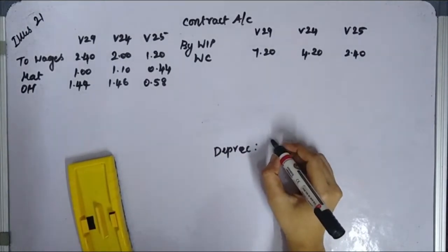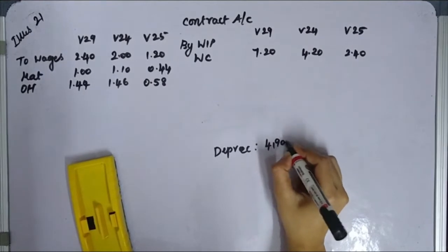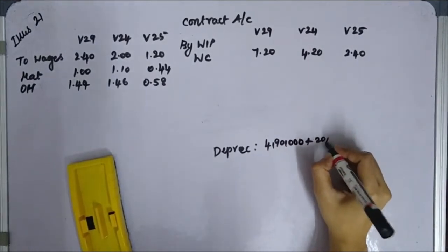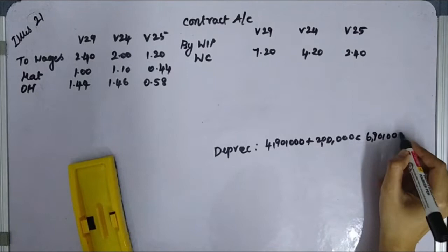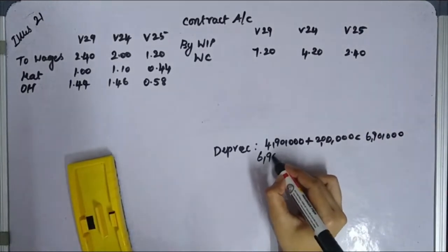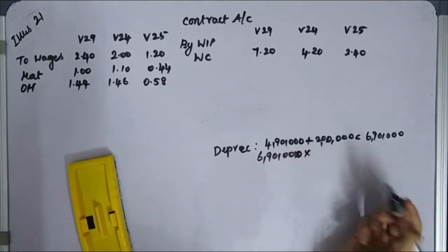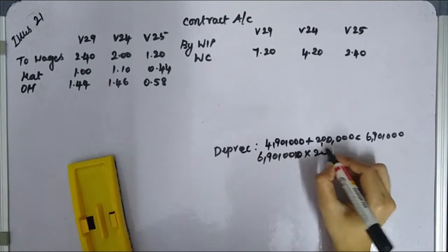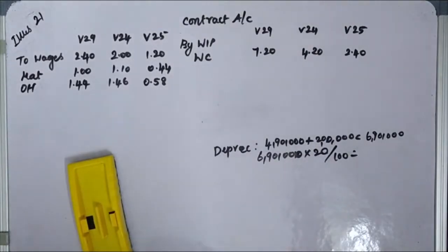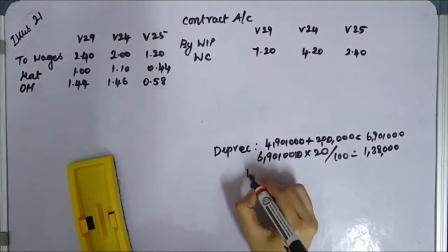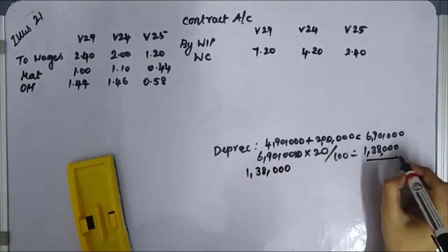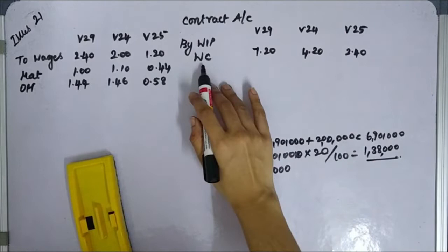Depreciation calculation: Plant and equipment is Rs 4,90,000 plus vehicles Rs 2,00,000, giving a total of Rs 6,90,000. Applying 20%, the total depreciation comes to Rs 1,38,000. This Rs 1,38,000 will now be allocated to the three contracts in proportion to the value of work certified.